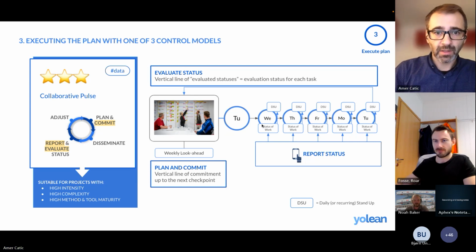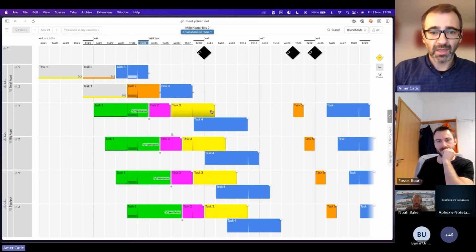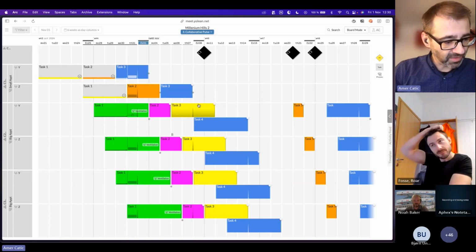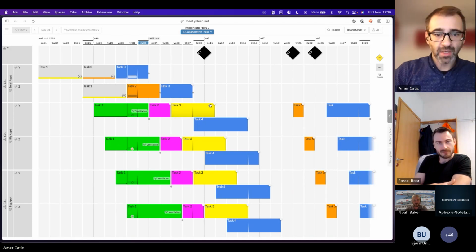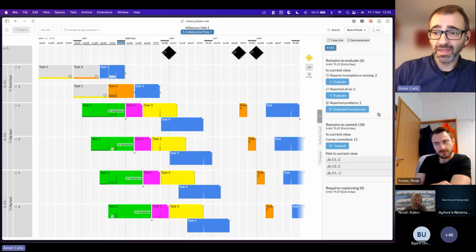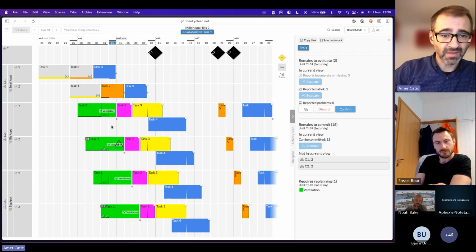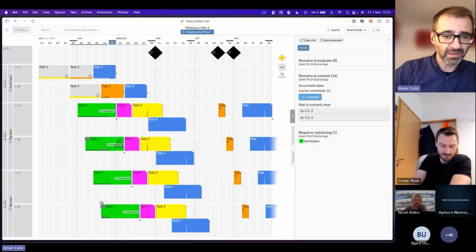To illustrate here, I will just very, very quickly show the other board. So here I have some tasks again. They have been evaluated up to Wednesday. On Thursday, I'm doing it from my phone here, and you will see some things pop up as I do. Let's say I had one problem. So here I have these, and again, if I go in here, I can quick evaluate others that have not been reported with mobile. I can evaluate from the journal here, confirm that these tasks, I accept their report, and I can evaluate the rest with OK. So I get, again, a vertical line of statuses.